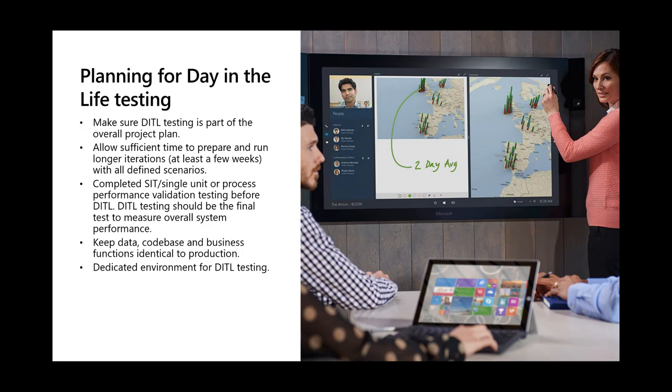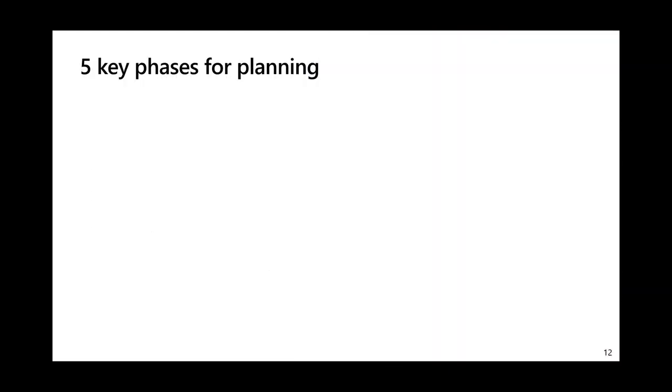Ensure code promotion is the same as the production environment, or golden version in the golden environment, before or after go live. If you have code promotion in the production environment, I would suggest you put the package deployment in the live testing environment and run all scenarios to see if there are any critical issues before you do the code promotion in the live environment.